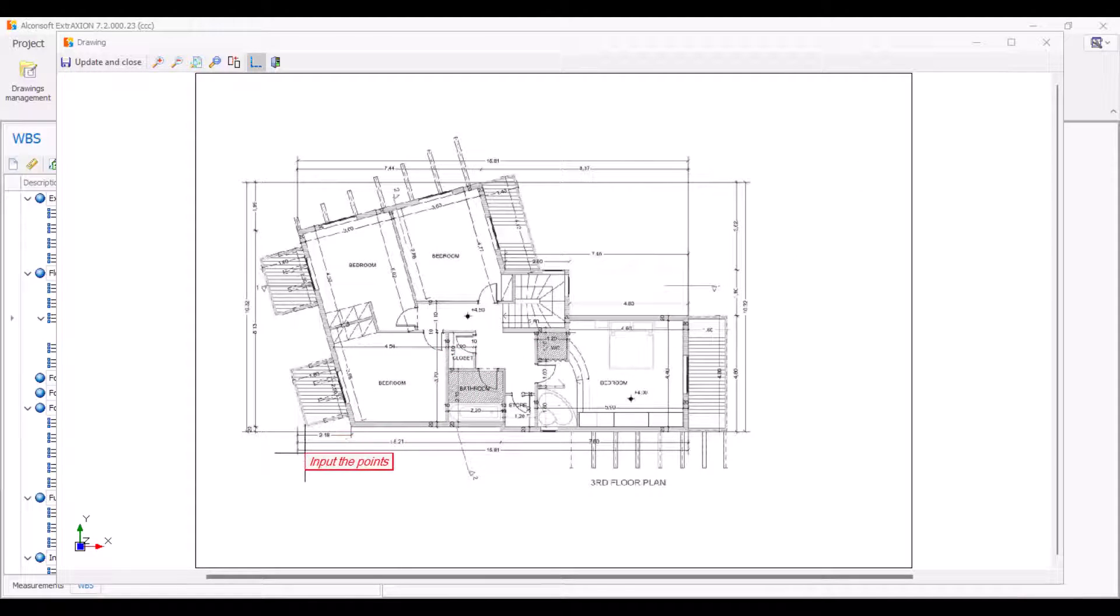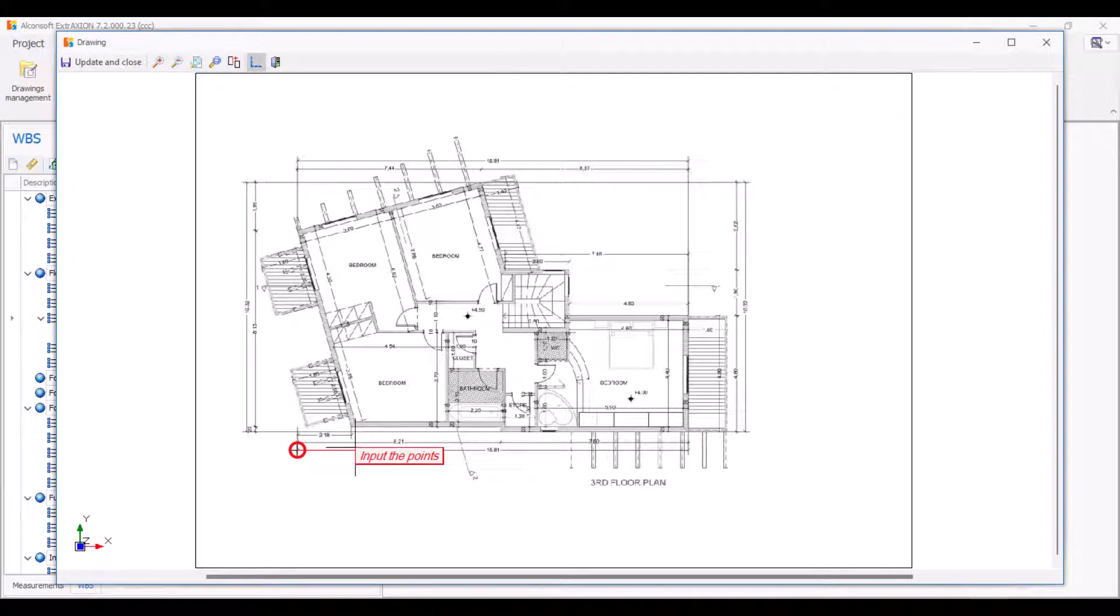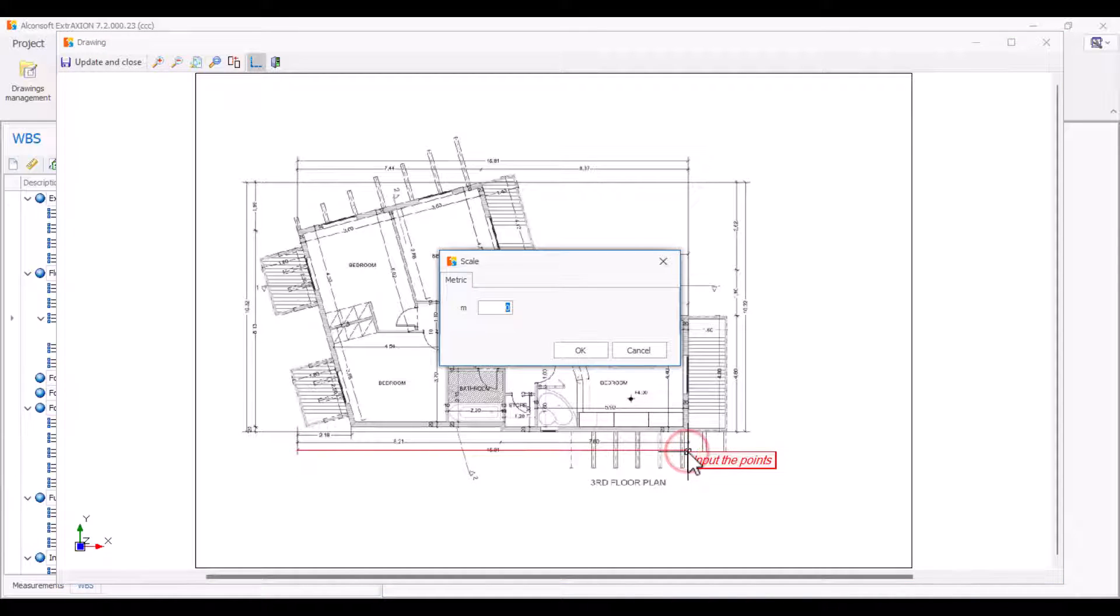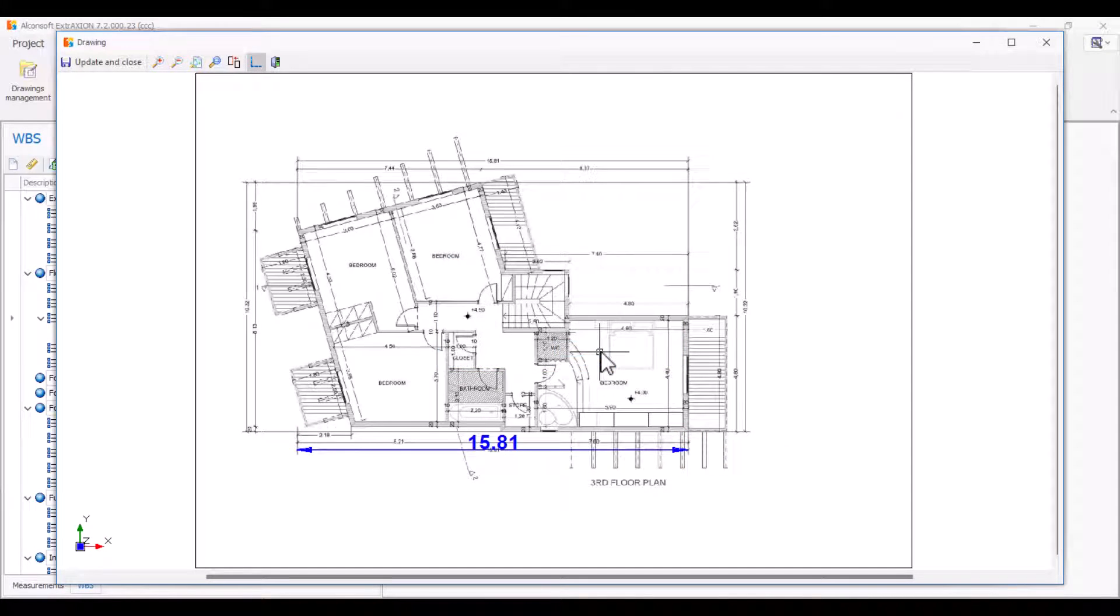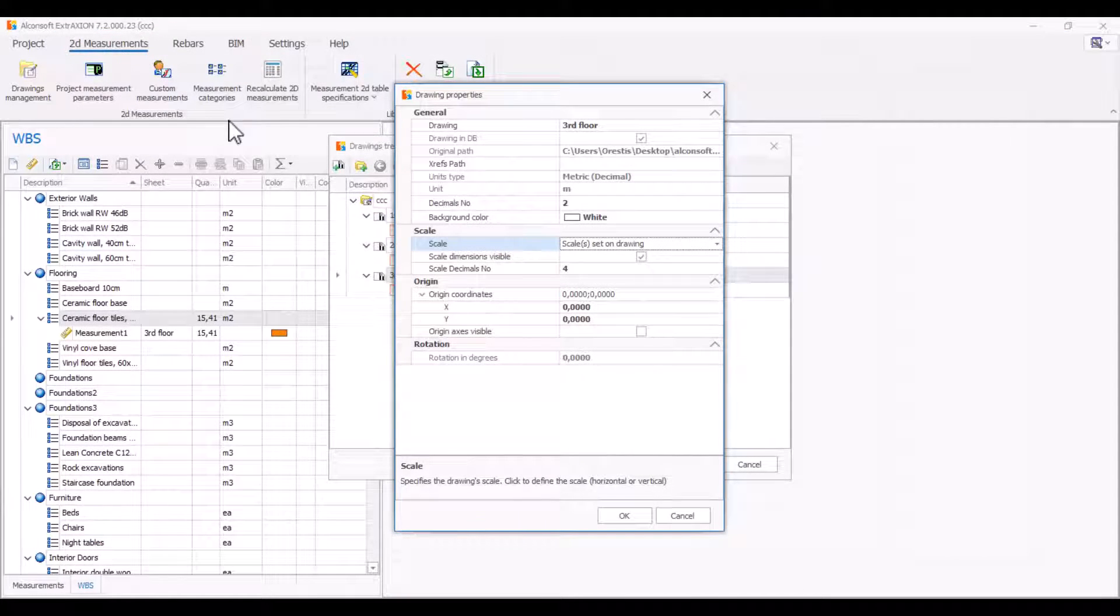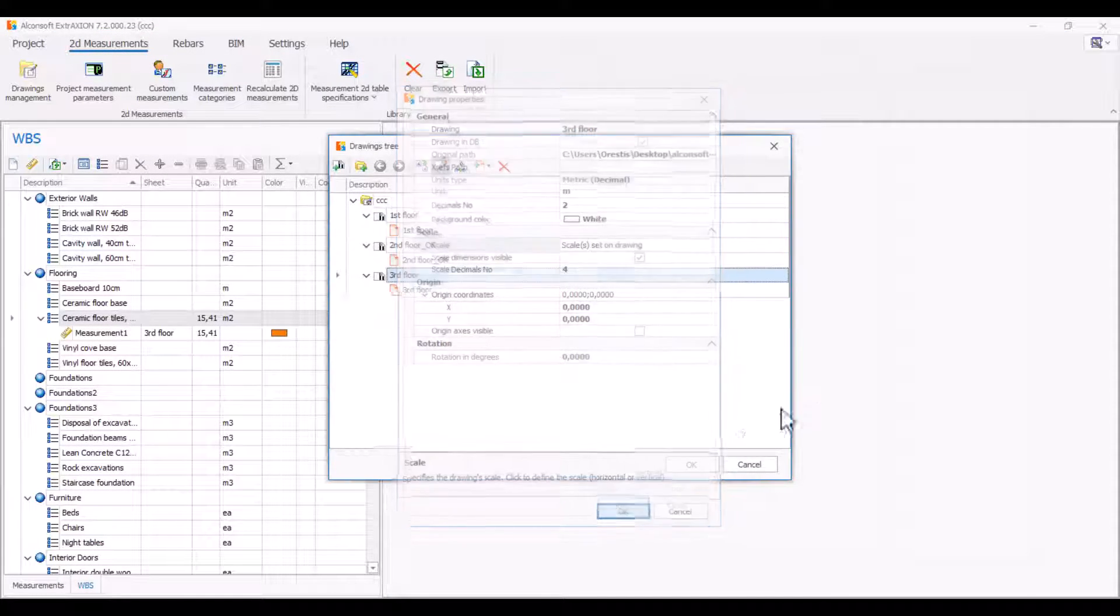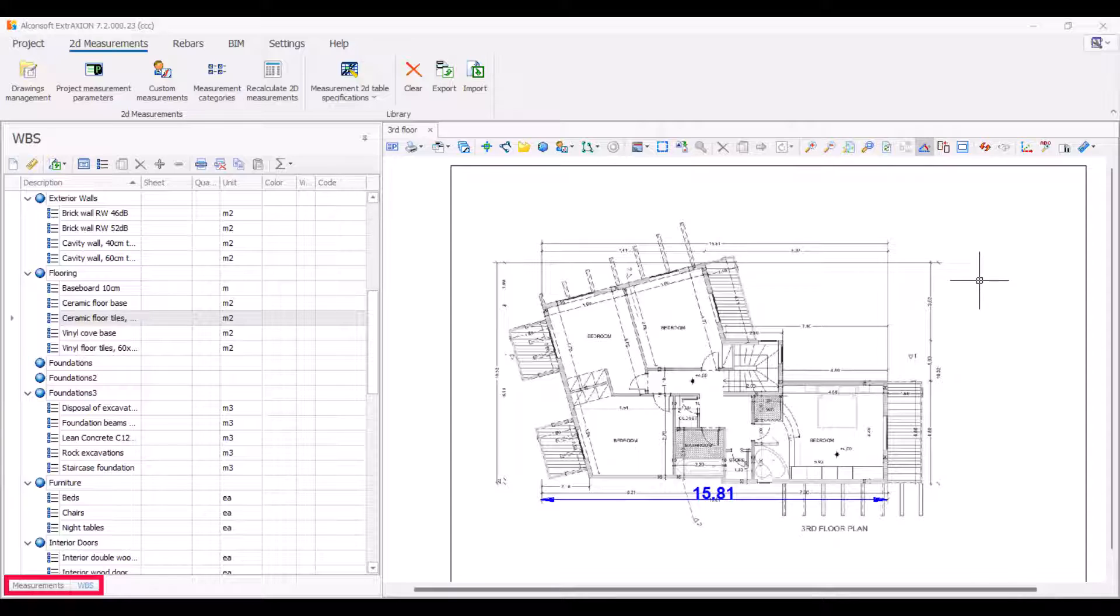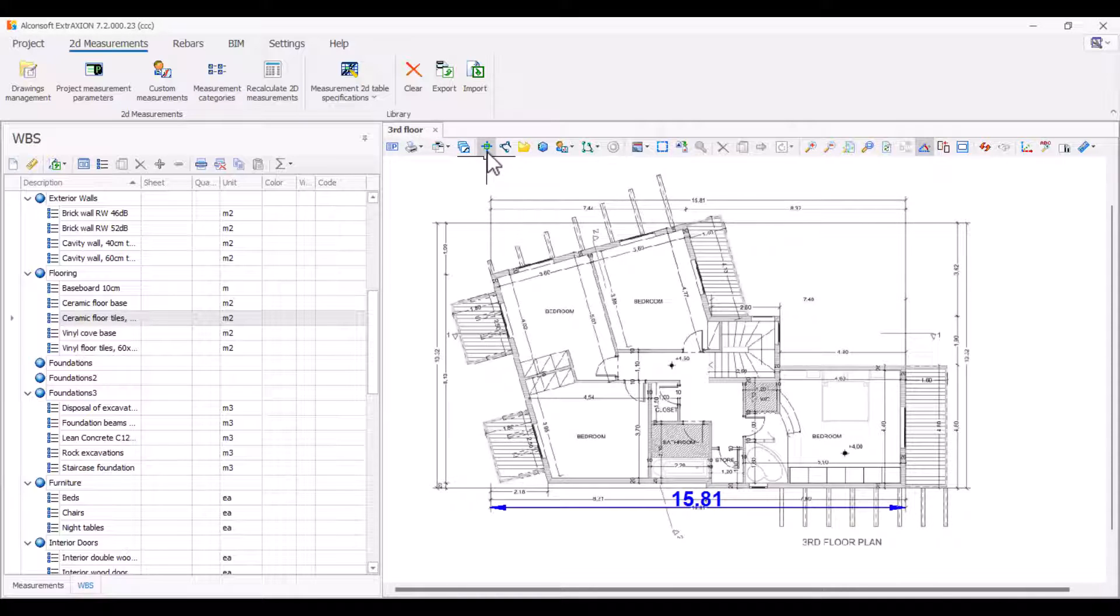Locate a large dimension line, mark its edges, and enter its specific length. In the lower left part of the screen, there are two tabs: measurements and WBS. You can now start adding your measurements. You can count items, measure length, area, and volume, as well as make custom measurements.